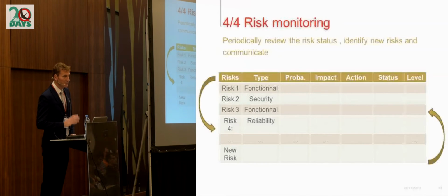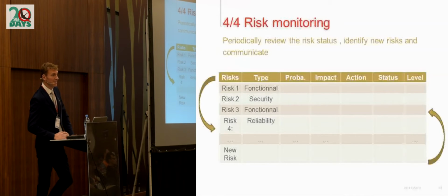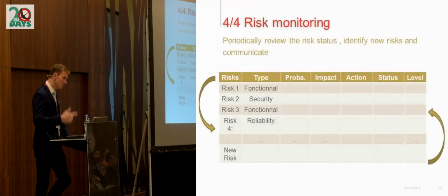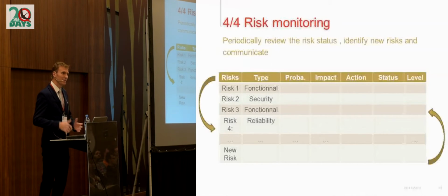I see many projects where people start the project with much time. They are very motivated, so they decide to manage the risk. But then, once they are very busy with their daily activities, they forget to monitor and to update the risk repository. So that's a shame, because in that case, it's not helpful at all. So it's very important to continuously assess, monitor, and update the risk repository.